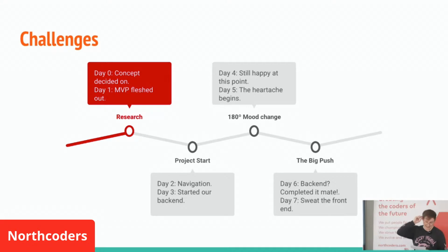Whilst we had our navigation nailed down in day 2, we should have set up our user authentication at the start as well. But by the time we'd reached that, we decided to prioritize other things like the functionality and feel of our app. But having that authentication set up and working would have influenced a lot of where we could have been by that point.